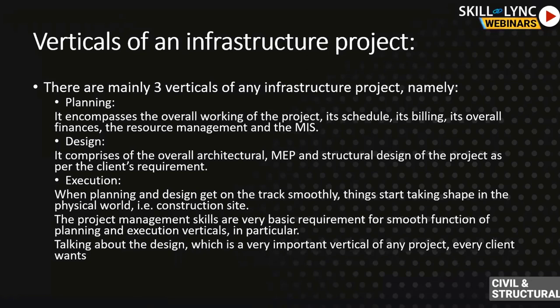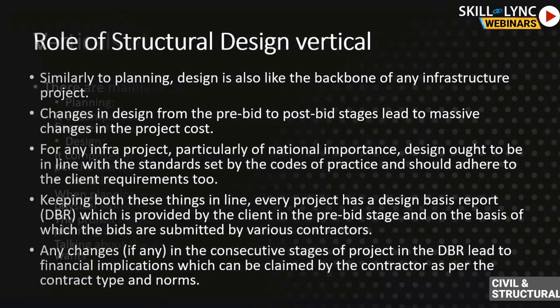The design vertical is the backbone of an infrastructure project. If the design is bad — for example, putting too much steel inside columns and beams — it is uneconomical and can cause galloping costs. Changes in design from pre-bid to post-bid stages lead to massive changes in project cost. For a project of national importance like a metro, design ought to be in line with the standards set by the codes of practice. The main codes used in metro projects are the Indian Railway Standards, IRS.